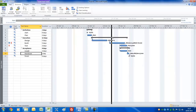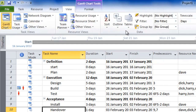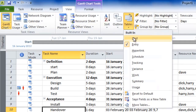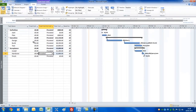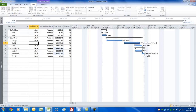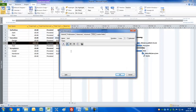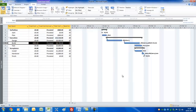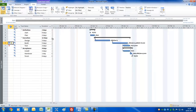Now let's look at the Cost table. Go to View > Tables > Cost, which has a Fixed Cost field. For the Build task, in addition to the cable drum, we'll add £400 as a fixed cost for other materials. Double-click the task, go to Notes, and add a note that the £400 is for hotel and travel expenses — this helps remind you what that cost was for in the plan.